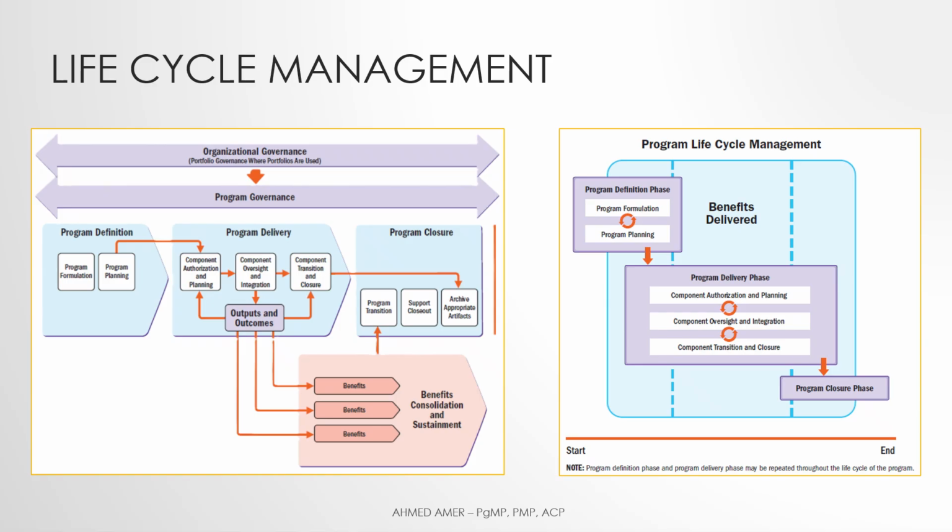Programs start with the definition phase. This phase consists of two subphases as the figure shows. The program has to be authorized first and develop its program business case, program charter, and program roadmap. Once these documents are developed, reviewed, and approved, the program management plan is prepared.